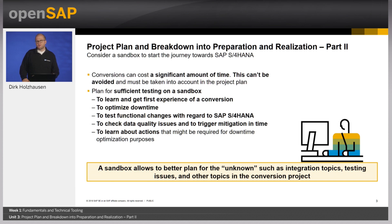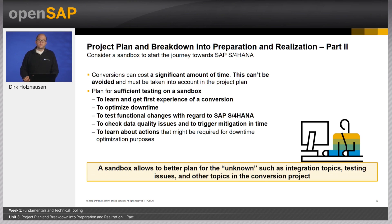A sandbox offers even more advantages because it can be used for many different purposes: to learn and get first-hand experience of a conversion, which can be used for downtime optimization; to learn and test about the functional changes relevant to your environment described in the Simplification List; and to check data quality issues and trigger the right mitigation activities with the right stakeholders in time. Note that for correcting data issues in finance, business stakeholders might need to be involved. One might argue that building up a sandbox extends project time, but a good preparation for an S4HANA conversion is everything. In a nutshell, a sandbox allows you to better plan for the unknown in your concrete environment, which can then be reflected in the project plan.